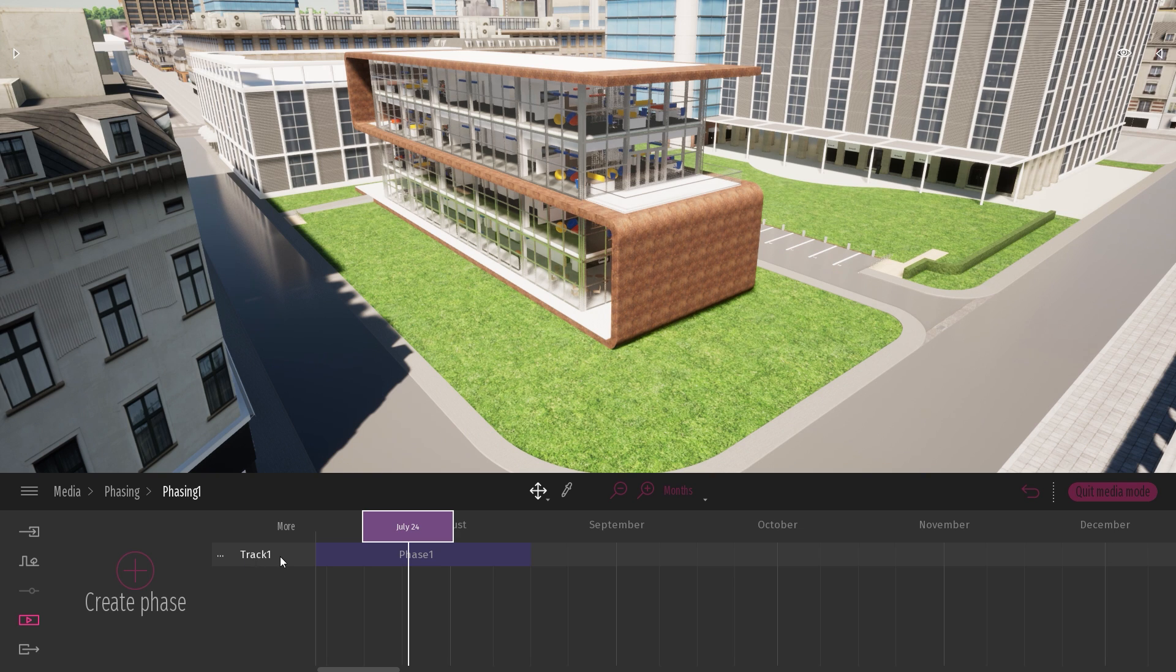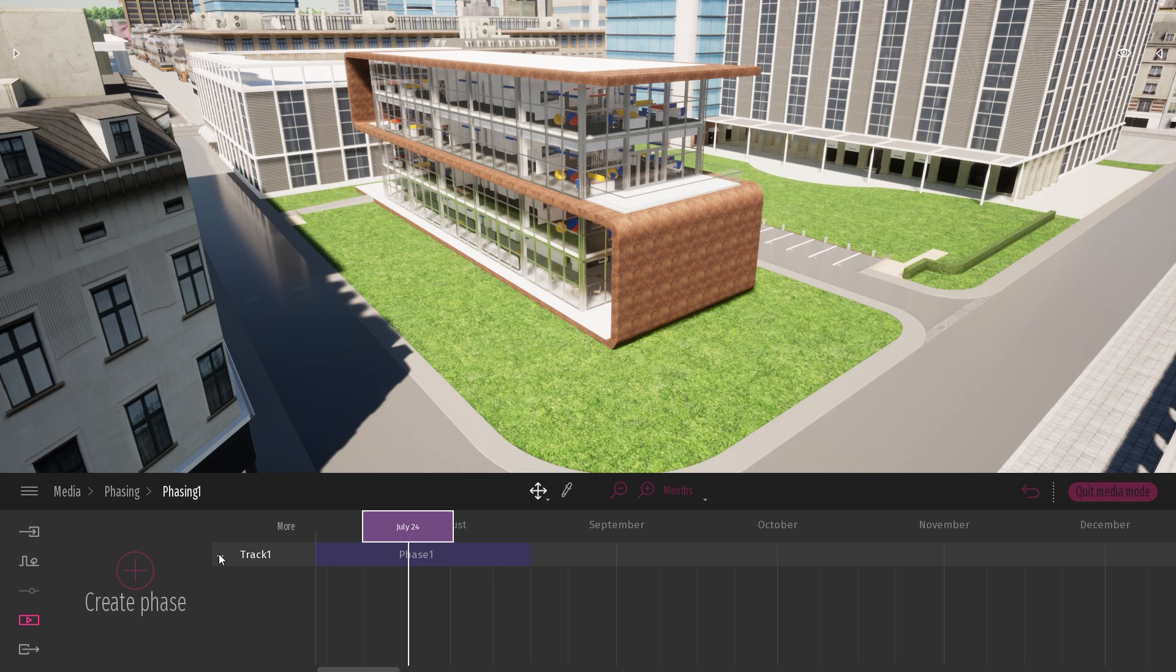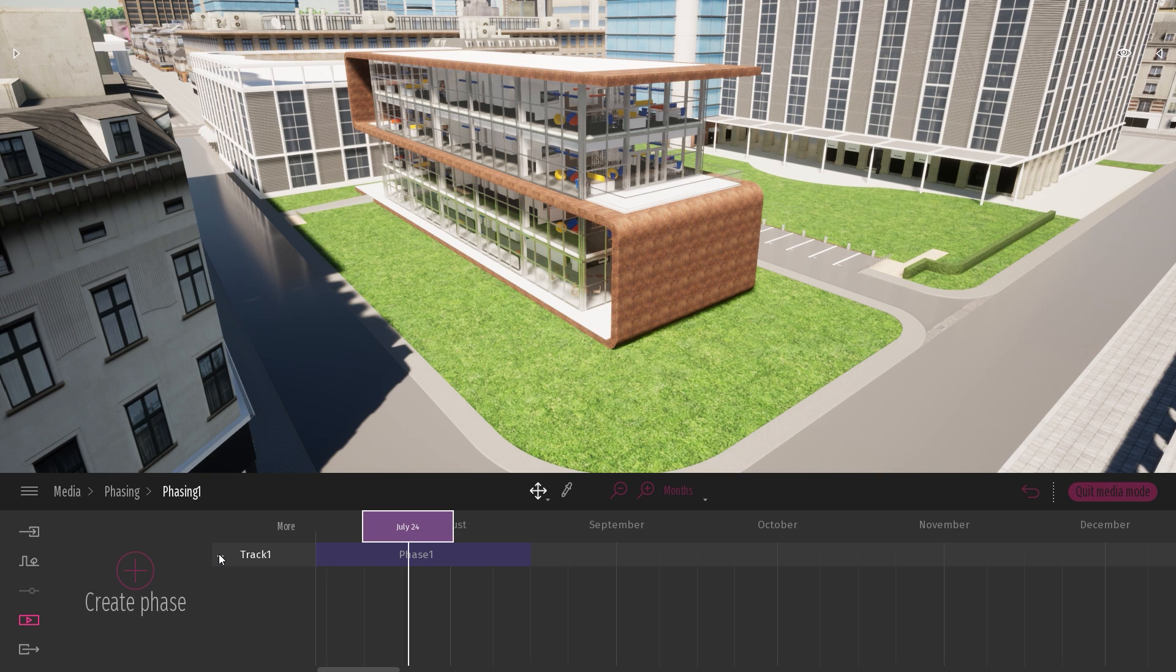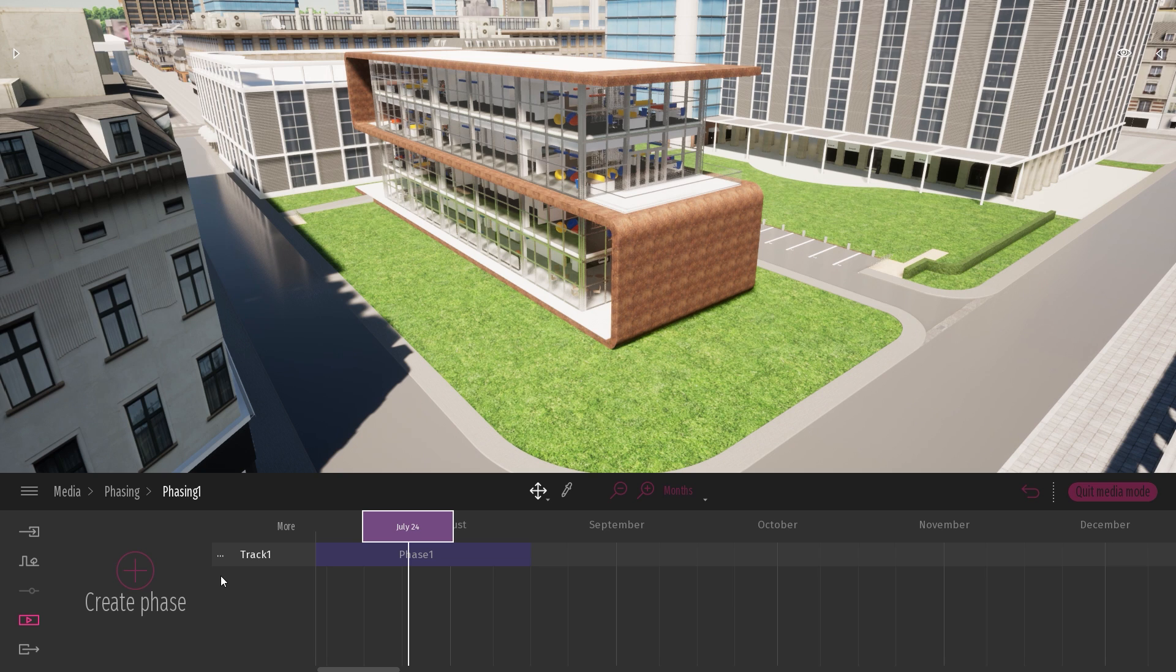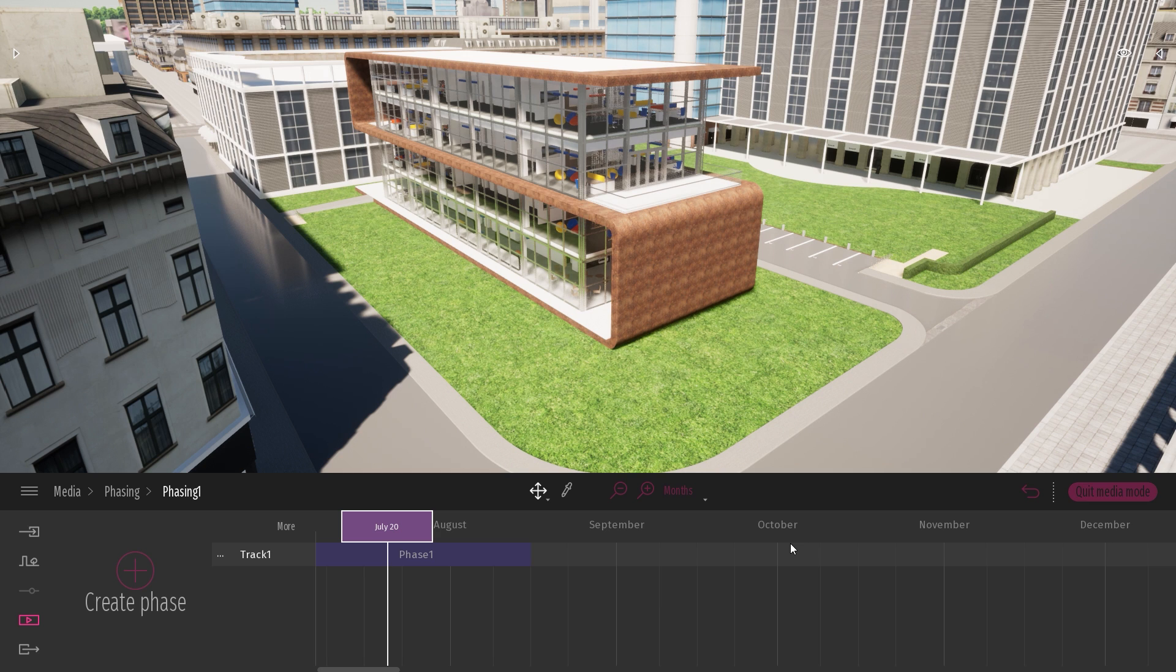And here you have a track. A track is basically where you will create all the phases. You can also create multiple tracks. A track could be for example for a specific task, like the crane that comes and needs to be present for a specific set amount of time on your project. So you can have a track dedicated to the crane. You can have a track dedicated to the excavator. So you can visualize that the excavator will be present for a couple of months, for example. So without going into too much detail, let's start to create a couple of phases.